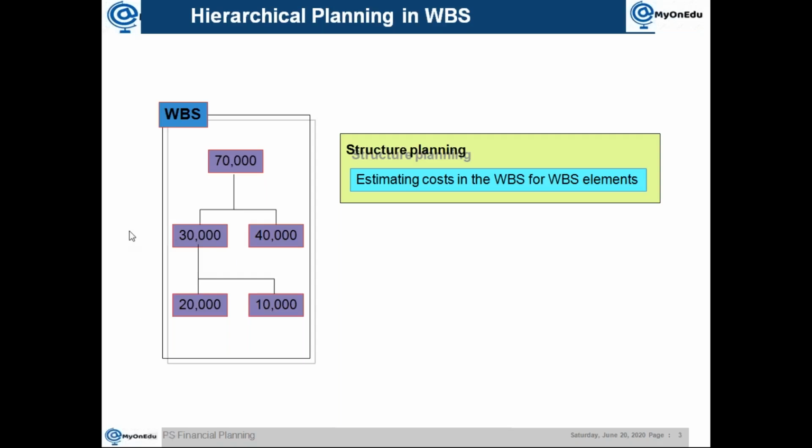What happens is you will get consistent data. For example, here 2010, then it should be 30 years, so you don't need to make it more than that. You keep this one not a planning element, these two will be planning elements, then these two values will be rolled up here. So this is how you do a hierarchical cost plan.